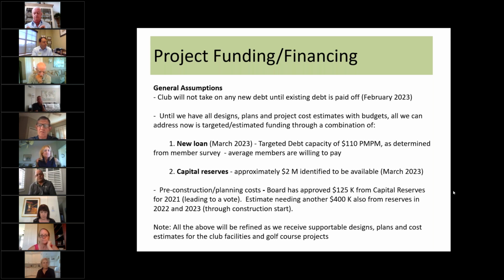As general assumptions, we are not planning on taking on any new debt until the existing debt is paid off, and that will be paid off in February of 2023. But until all designs, plans, and project cost estimates with budgets are done, all we can address right now is a targeted or estimated funding through a combination of two things: one is a loan and one is capital reserves.